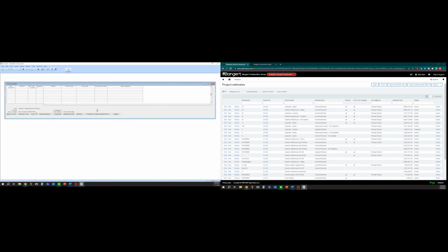And same thing for categories. I can either get it right. I'm not sure if it's M or what, but I can just click my list and it is. We'll say material. Actually, we'll say labor on this line. And in this case, I am going to put in units. It's going to take 60 hours of labor at $100 an hour.